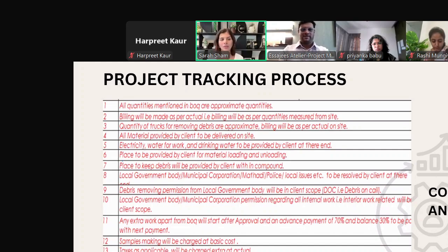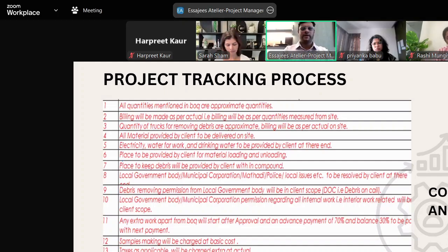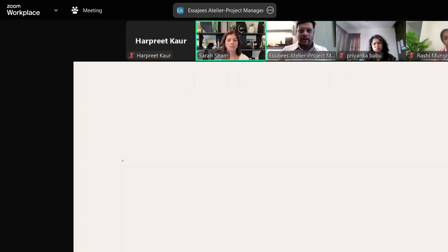There are lots of delay clauses also that get built in. Important. Like, this is super important, guys. All of these become points to manage your project, manage the contract. Yeah. And also, when we plan our project timeline, we share with our contractors. We put our clauses also. If there are any delays due to contractor, there will be a delay penalty. Day wise, monthly wise, if there are any delays from contract.